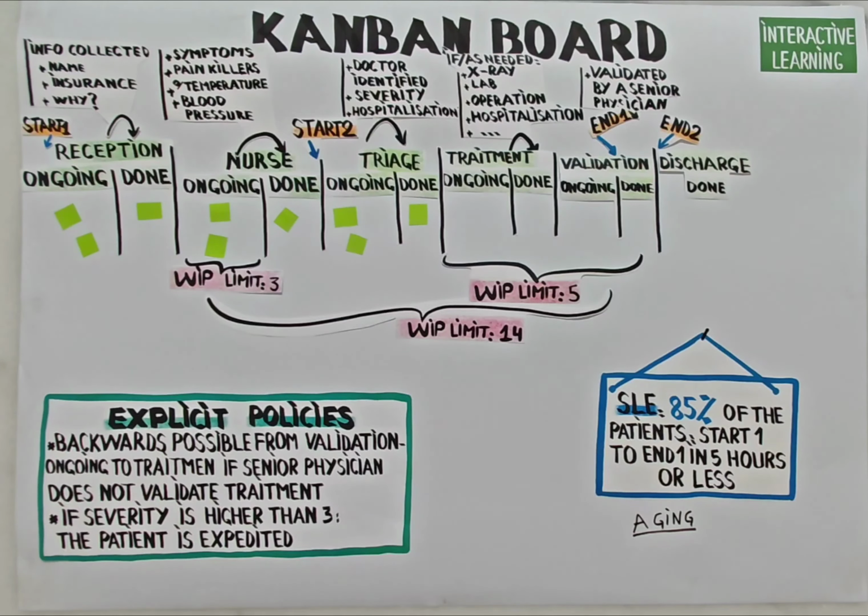Kanban is not just about defining the workflow, it's also about improving it using insights from measures like work item age, throughput, WIP, and cycle time. Continuous improvement is central to Kanban. By regularly analyzing metrics like cycle time and work item age, teams can identify bottlenecks, refine processes, and adapt to changes, ensuring ongoing optimization of the workflow.